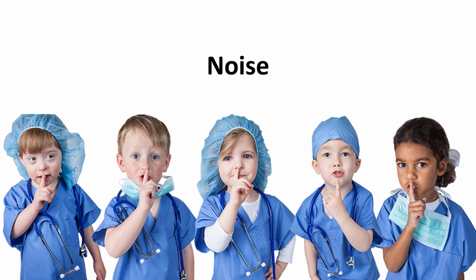There are sensitive areas within the hospital where noise and vibration could be disruptive and negatively impact hospital operations. Please coordinate with your foreman and Clemens superintendent about any activities that may impact the hospital's day-to-day operations, including drilling hangers and anchors. Remember, restrictions change daily and are area-specific. Therefore, communicate daily about your activities and plan your work ahead.